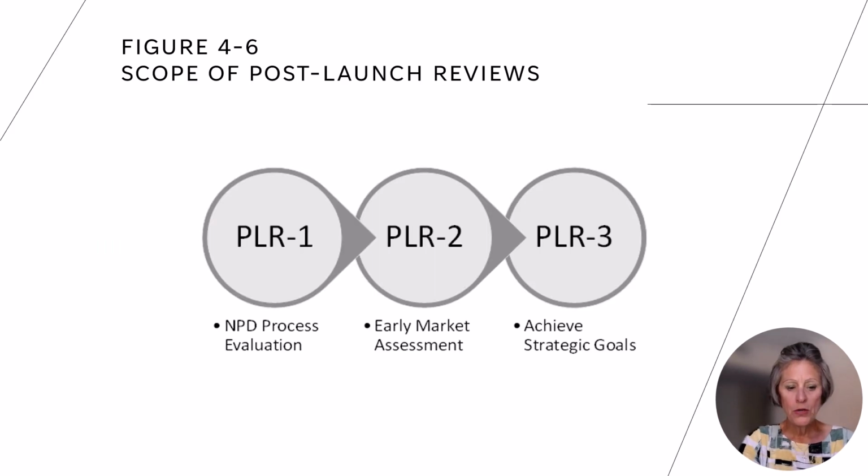Those gate criteria include, does the project fit with the overall business strategy? Is there a direct tie to the innovation strategy? Does the product support global initiatives, or is the market limited? Is there a clearly defined customer need? Is the market attractive? Who are the direct and indirect competitors? Are there growth opportunities in the market?